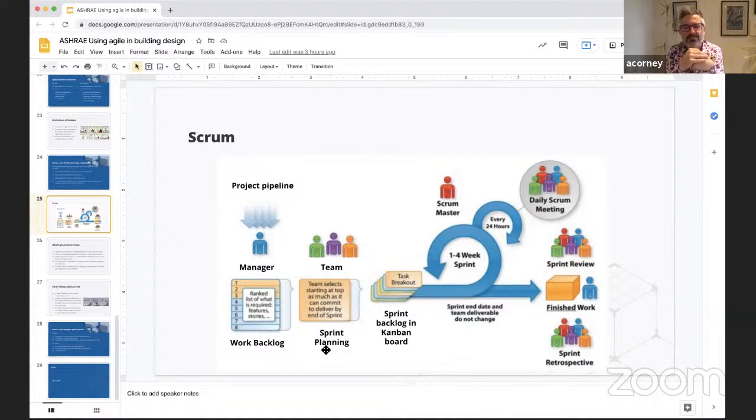Generally speaking, one of the other drawbacks of Scrum is that if you're not committed to delivering really good quality work, you can have people racing to finish the work and then not doing a good job on it, if you're not careful. And that's why the definition of done, the definition of work being complete, is really important in this process. This is a very high level overview of Agile, but that's how a time box might be applied in this process.